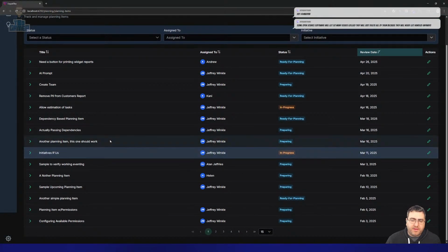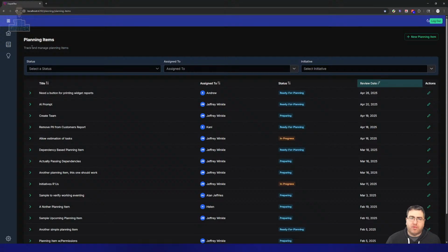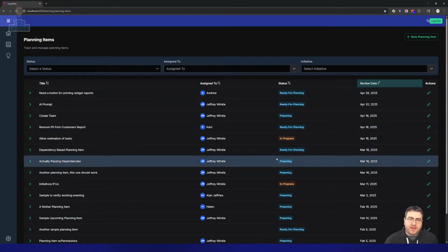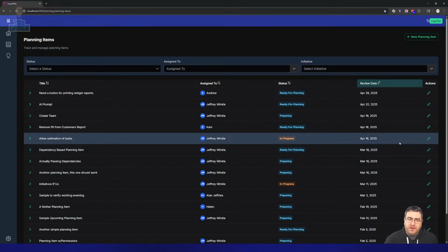So let's see what we are planning. And I was just saying, if you have a 20% rate of planning items sat there with tasks in the development backlog, then you probably are planning a bit too much and not taking enough time to plan what you have. If you've got a 50-50, you're probably in better shape. You've got some stuff in the long-term pipeline and some stuff in the short to near term.